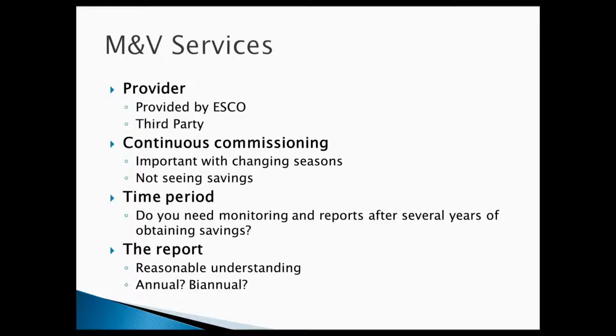Now, those stipulated parts are issues that are obviously not going to be covered by the ESCO's guarantee. This is a mutual agreement where you are saying in advance, we will agree without further measurement and without further cost that this will be the hours of operation.